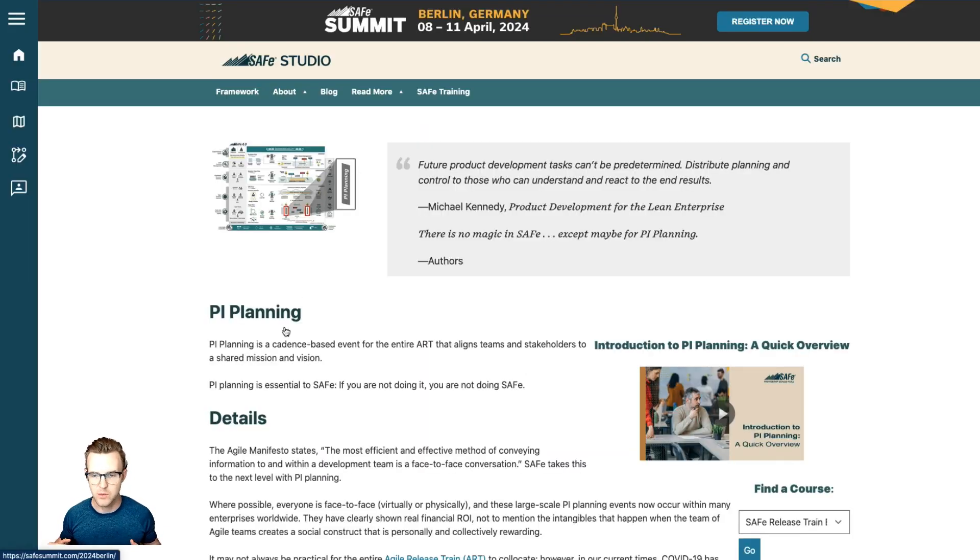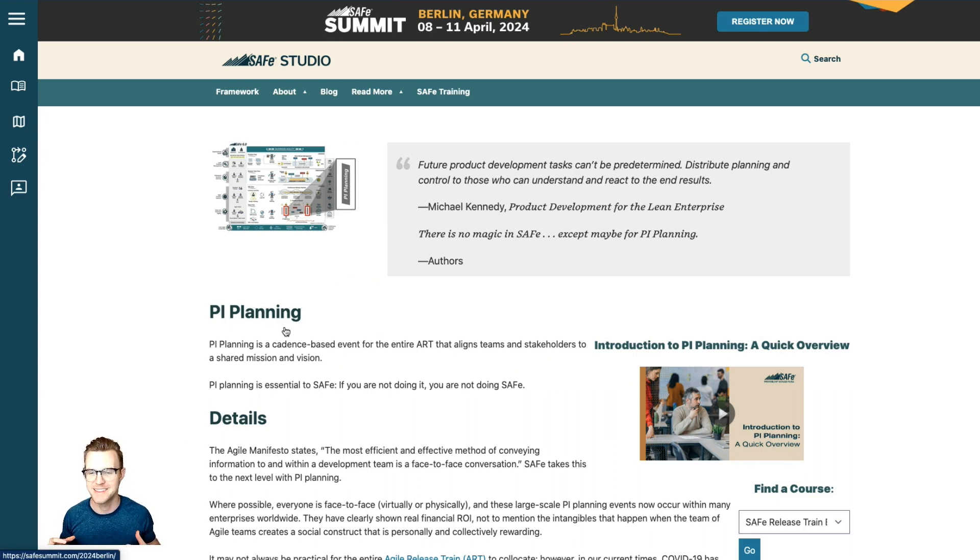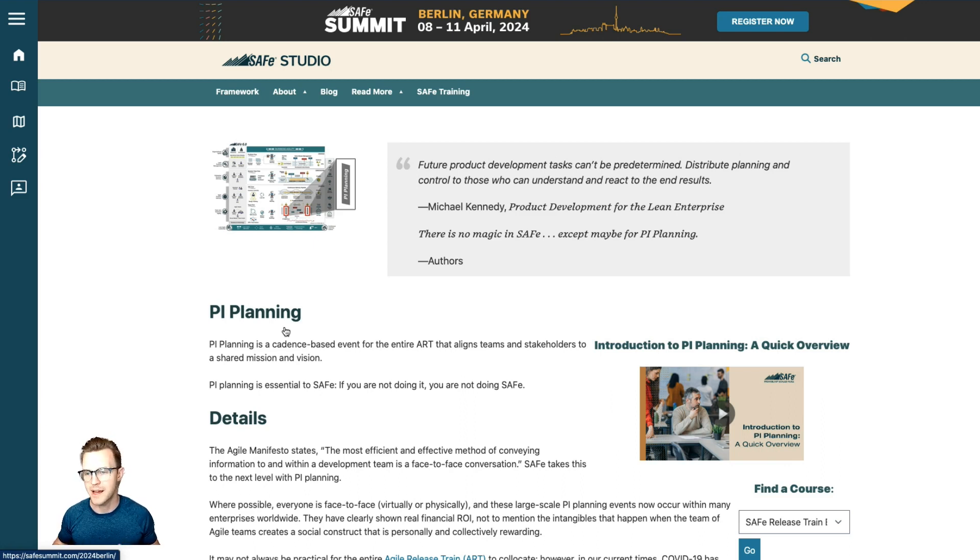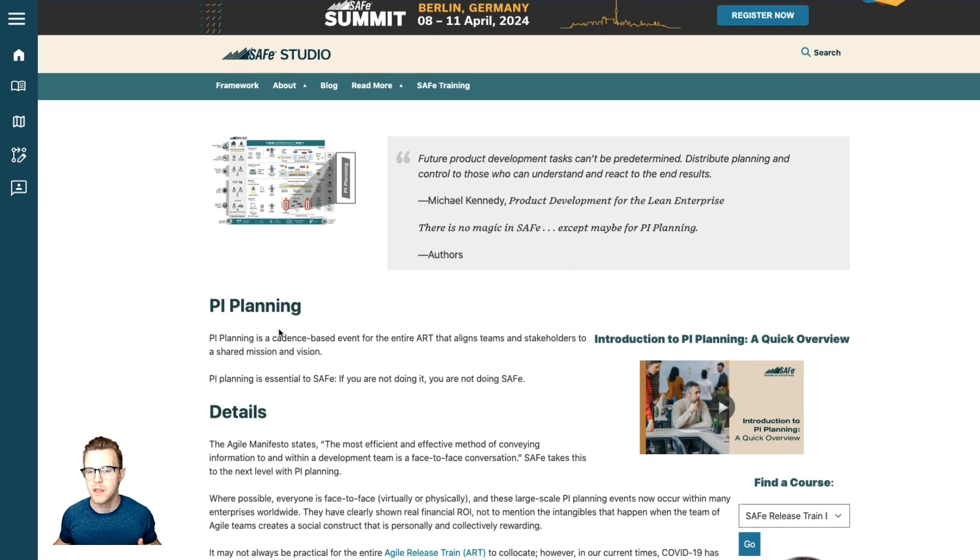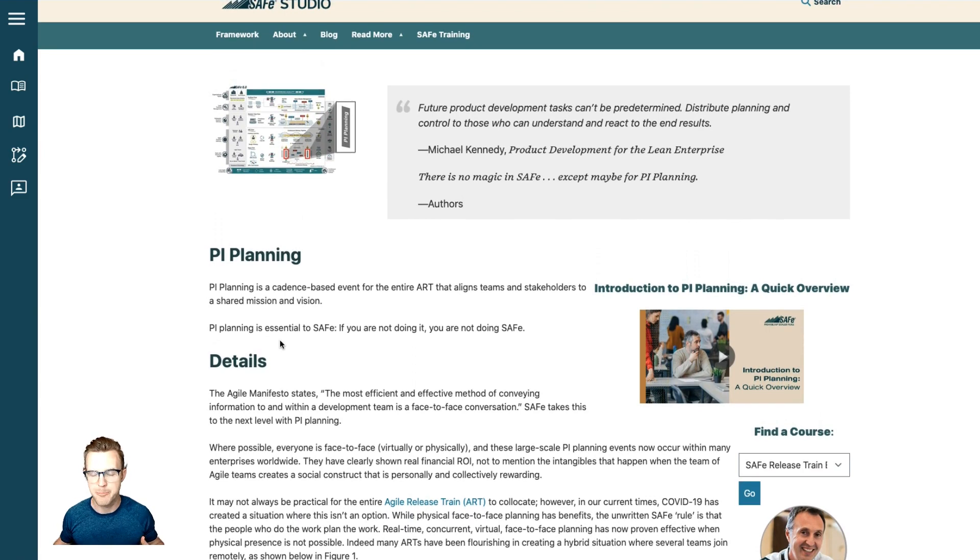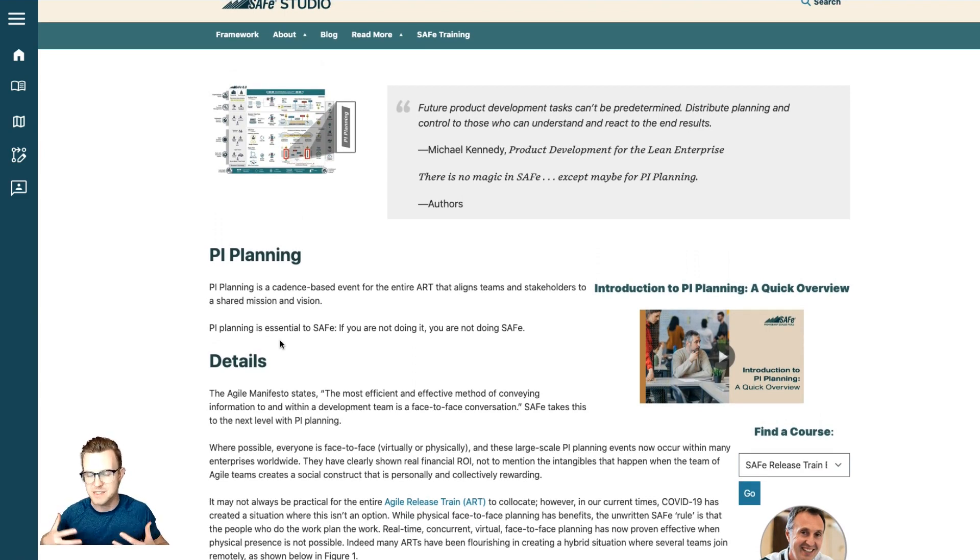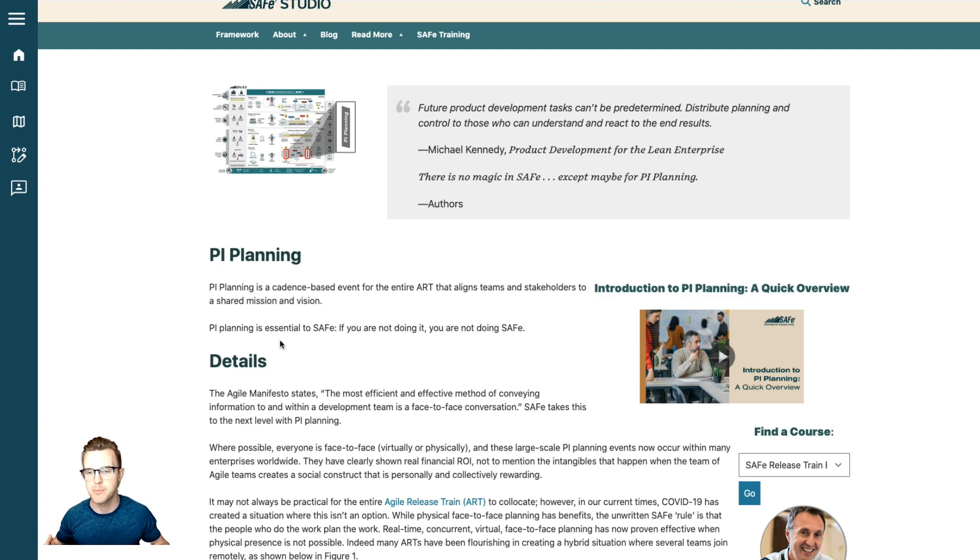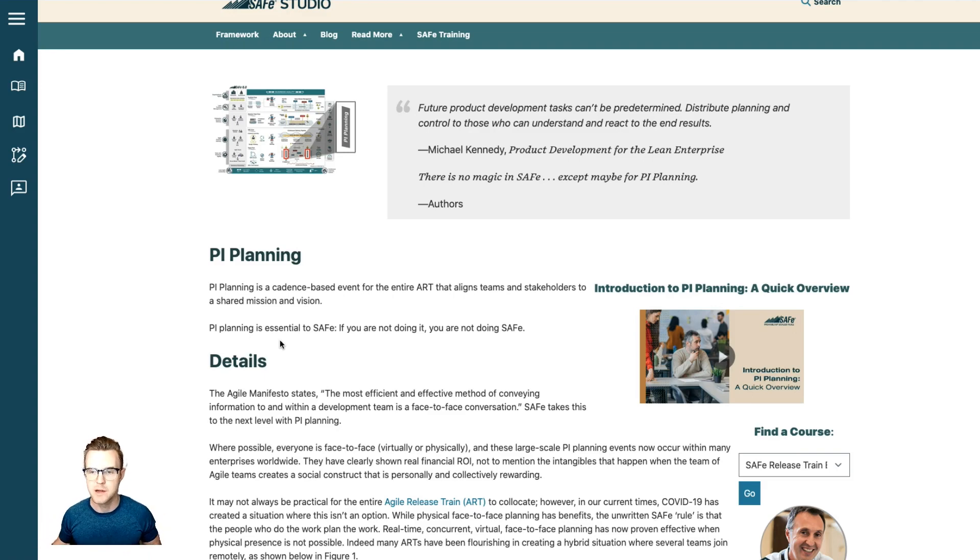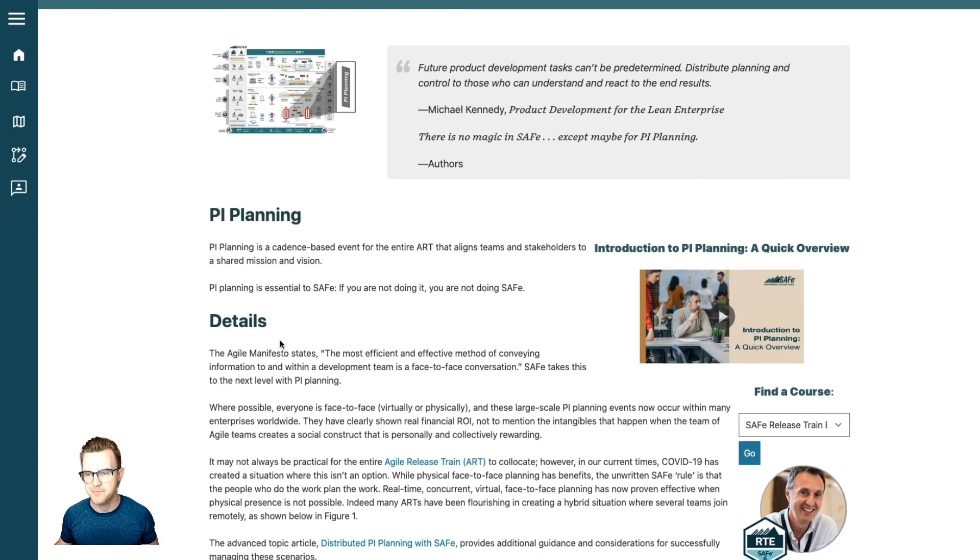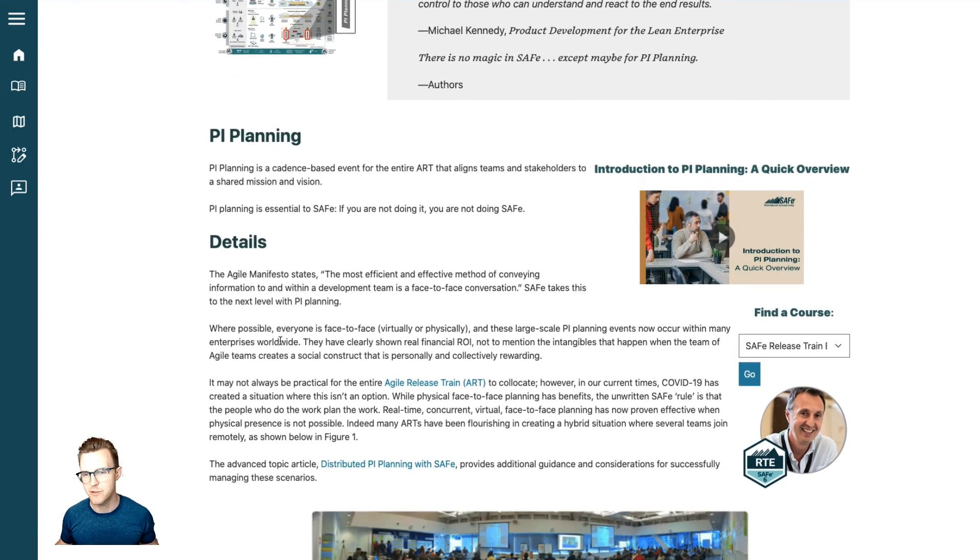What this is, is a big room filled with everybody in the product teams who are needed to build the product, to come up with a plan and align on a plan for the next two, three months. This right here is really important because it's like kind of a bottoms up approach to planning. You get the people, you come into this meeting with high level VP visions, and you give that to the team. At the end of this event, they break this up into timelines and then commit back up. So you can think of it like that bottoms up approach to planning.